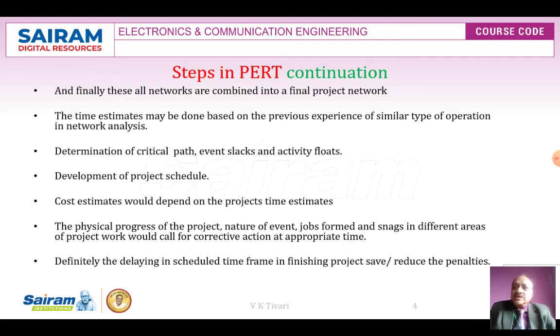Steps in PERT continued. Finally, all these networks are combined into a final project network. Then a time estimate can be made based upon previous similar types of operation in network analysis. Determination of the critical path, event selection, activity flows and development of the project schedule are also done.